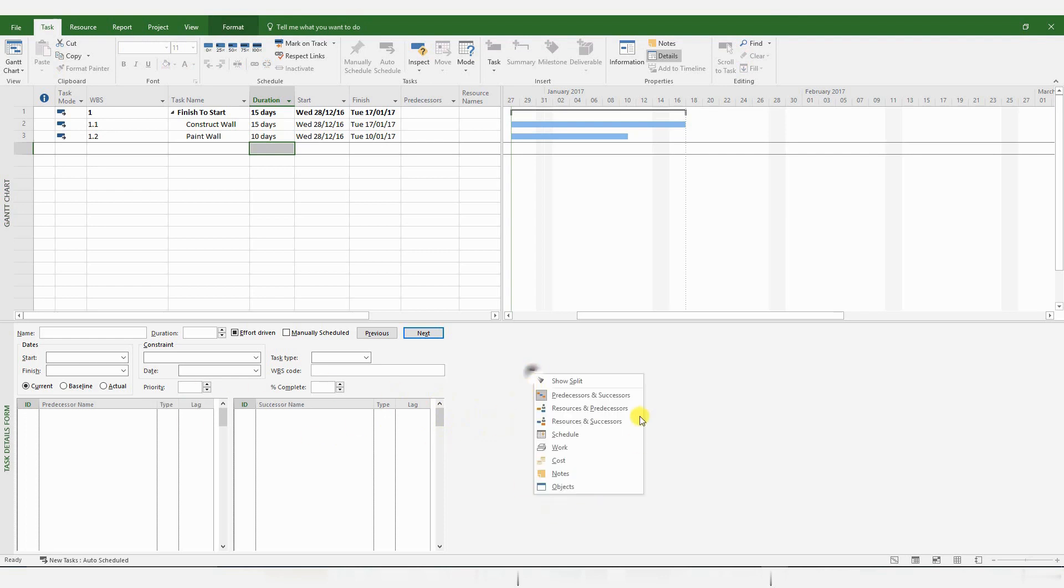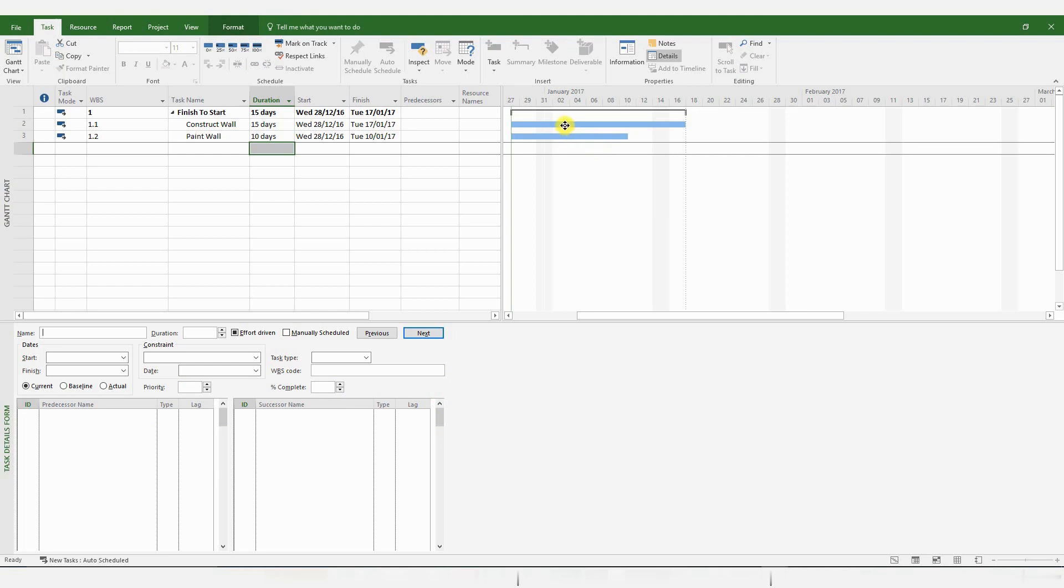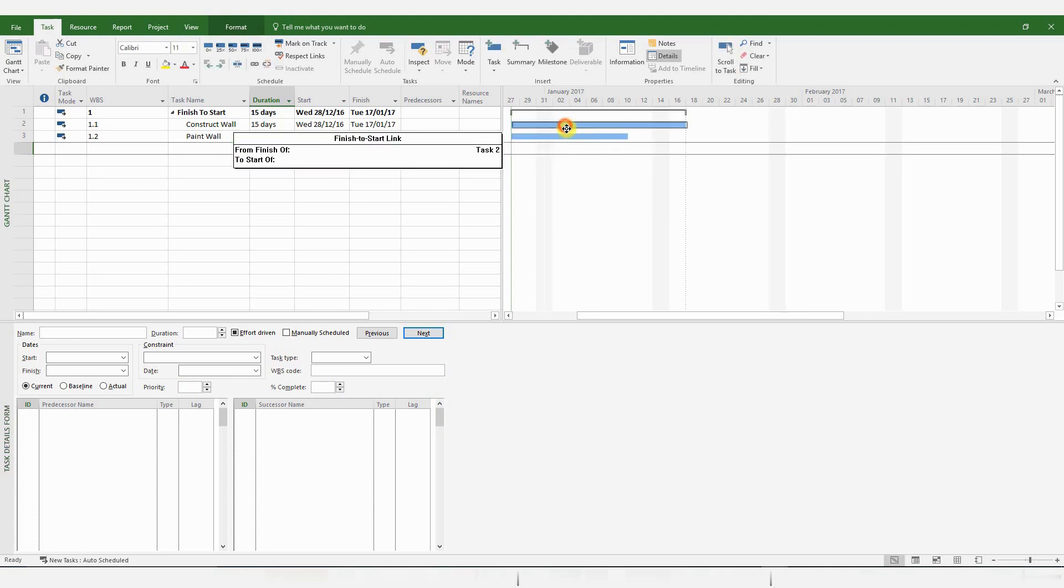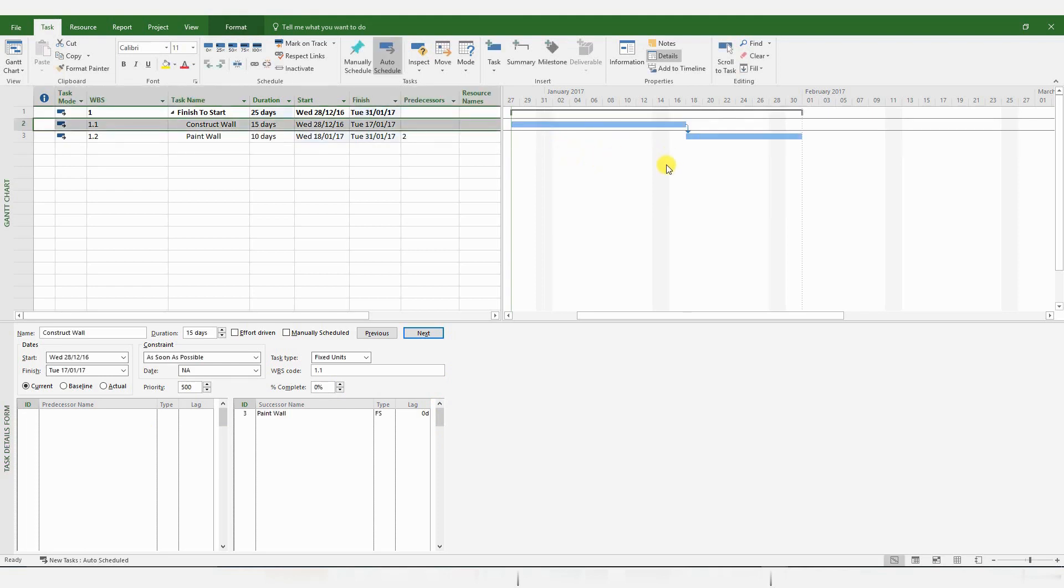I normally use the Predecessors and Successors menu. So you can choose whatever you like, but this is the most useful as far as delay analysis is concerned. And there are several ways to add logical links. You can simply click and drag, and a default Finish to Start relationship is added, which is what we want at the moment.